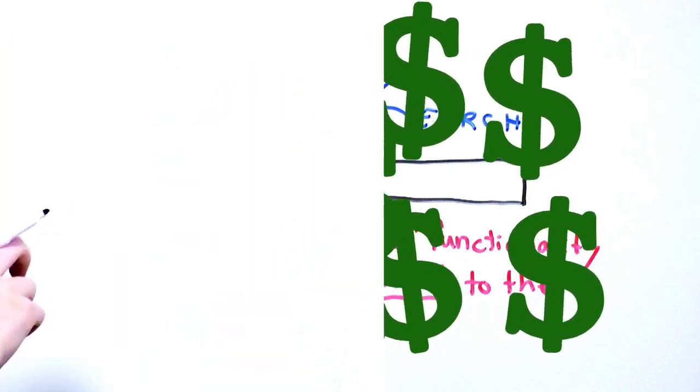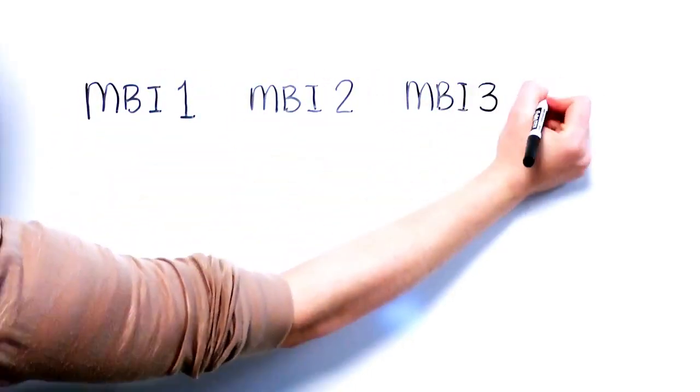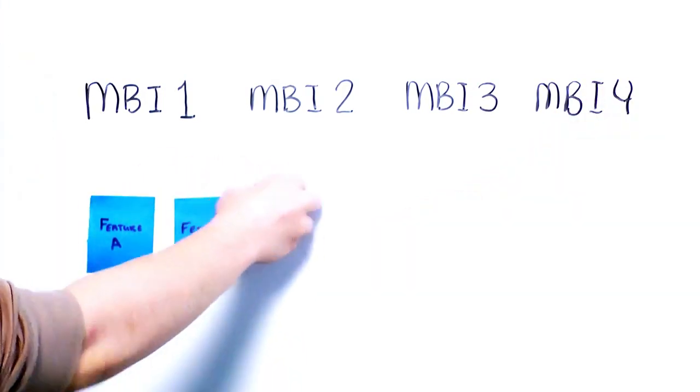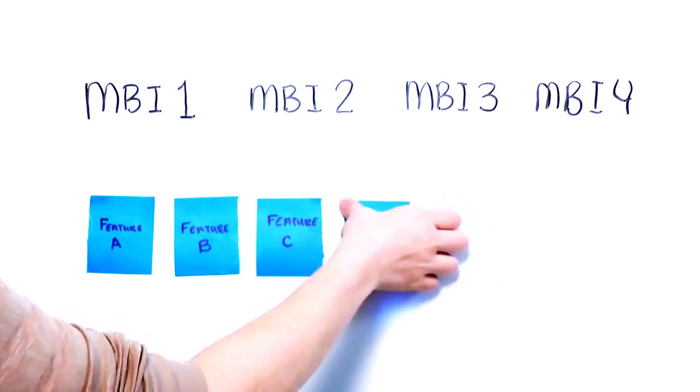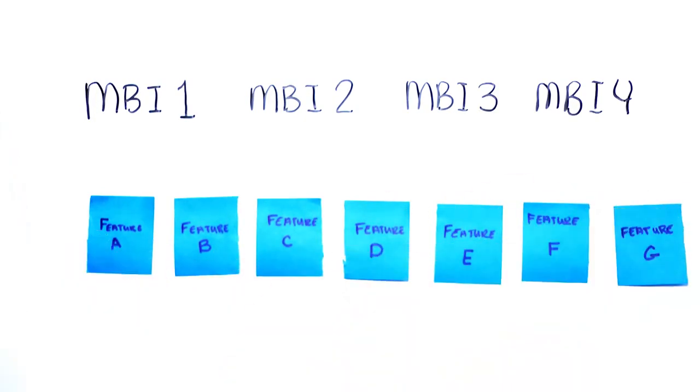Our team went back to a list of MBIs that had been developed early in the project. We eliminated the ones that had already been delivered, assigned to other teams, or descoped. We wrote the name of each remaining MBI on a whiteboard, then wrote the names of all the features that were already in the backlog on sticky notes and arranged them under the correct MBI.